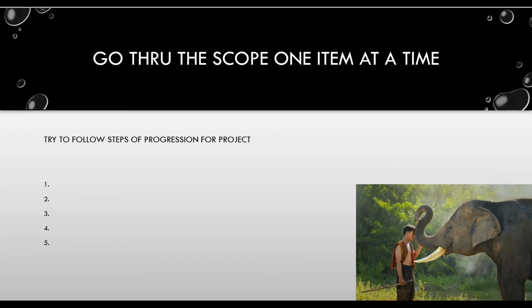The second thing you're going to do is water extraction and debris removal of anything that may have fallen or collapsed onto the floor. The next thing you're going to do is start some thermal imaging. I don't recommend getting a map down and trying to draw a detailed map in the first couple of hours you're on the job. That can be done the next day, when you've got more people there and you've got equipment set. But for your initial placement of equipment, go through this in baby steps and in progression. You're going to do the job.